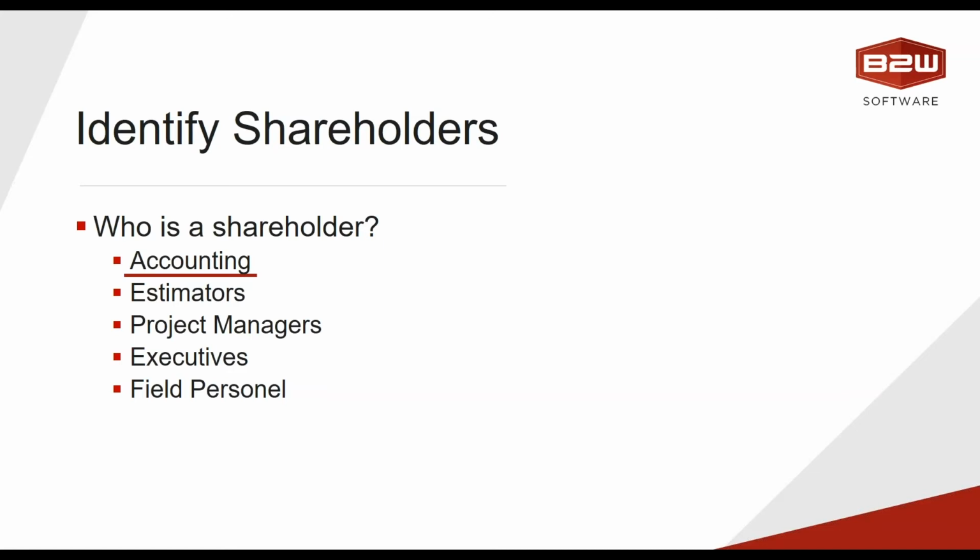And a lot of times they'll be able to tell you pretty reliably, well, you're considering a code difference here, but there's no difference in the work. It doesn't make a difference if my trench is 8 inches deep or if it's 12 inches deep, other than that I'm moving more earth around. It matters once you get to a certain depth and you have to build a shelf and then things start to change, but up until then, it's more or less the same.